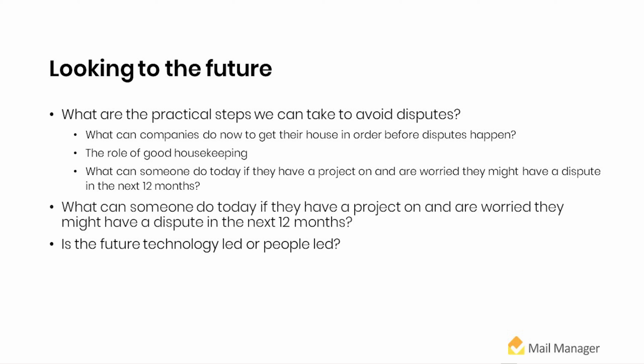And the really interesting thing here is that once you've finished a construction project, you can hand that over to your client. If it's over 6 stories, then it's relevant to the Building Safety Bill, which means you have to confirm that you followed all of the proper safety requirements, and that confirmation will be embedded in the concept of a golden thread, because you have to show that you have the right information. It has to be searchable, and you have to show that you can make that information available to the tenants who might need it, and the fire safety representatives, as and when they want that data. If you can't show that, then nobody can move into or live in your building. So that puts a really, really important onus on the client, the developer.